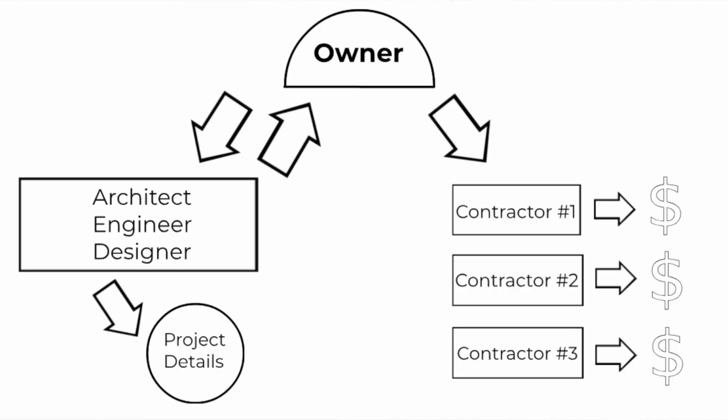It's a best guess because you were not working with that contractor to flesh out the project details. And because you were not working with the contractor, it's whisper down the lane. You worked with the architect, engineer, and designer. Now that went through you back to the contractor, and that contractor is trying to interpret everything that was said in the cheapest way possible to win the work.